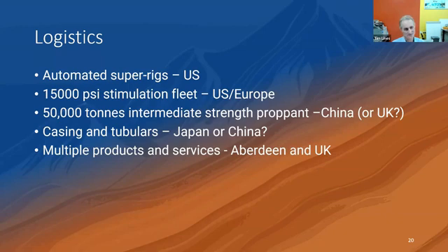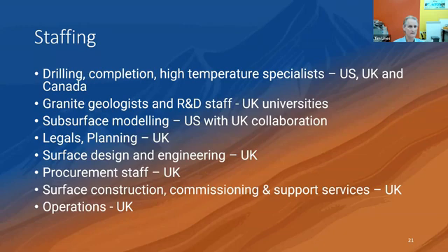You do need to think about this, and it needs to be part of the field development plan, because if you're going to order tubulars from Japan, then there are lead time issues that come into play, and those might affect your schedule, and it just needs to be looked at. Long lead items are always important, always a good thing to look at to start with.